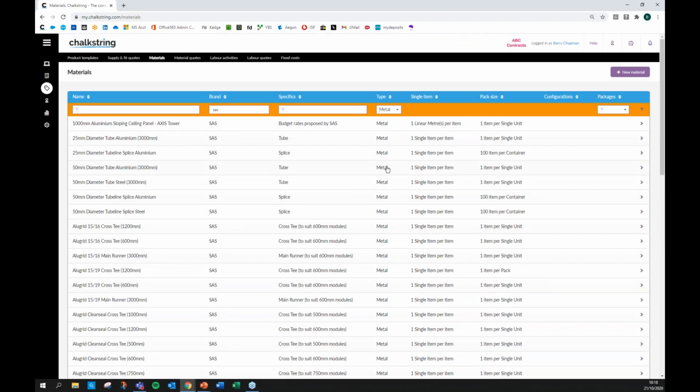It's also worth saying that you've got bulk purchase quantities in here as well. So this is more than just picking a material. When the software then moves on to procurement, it enables you to manage things like pack sizes. It enables the purchase order to round up to the nearest pack size or pallet size or bag, etc. Again, that's really more relevant to the procurement side of the software.